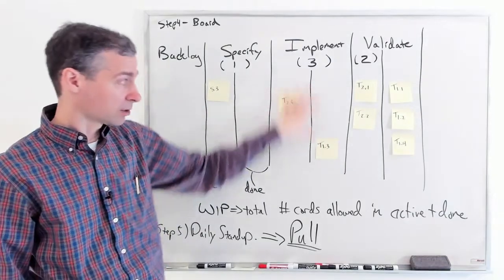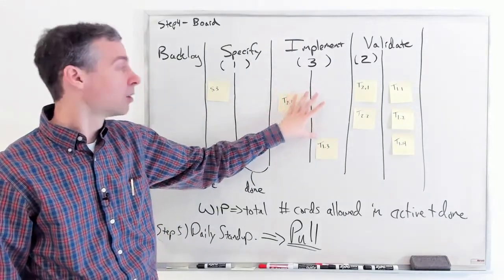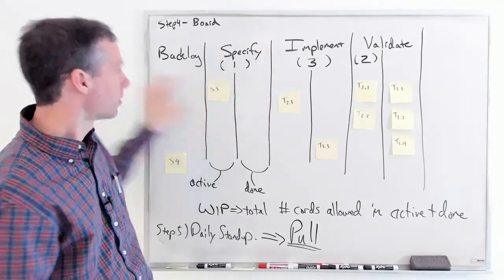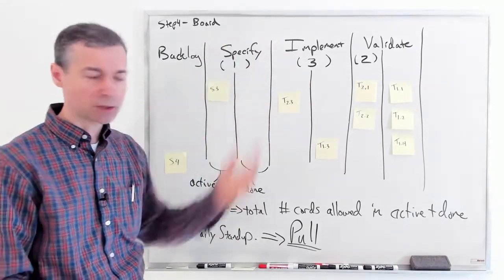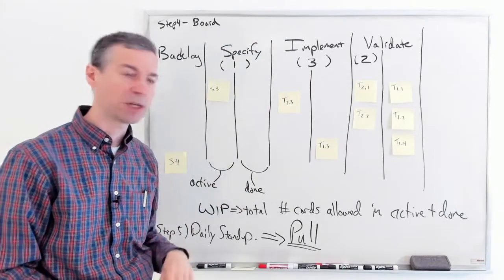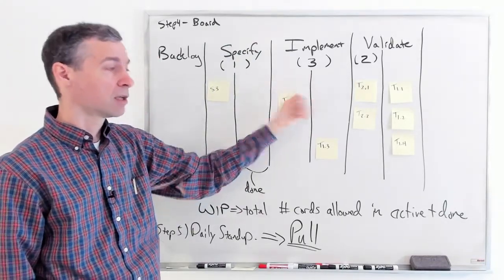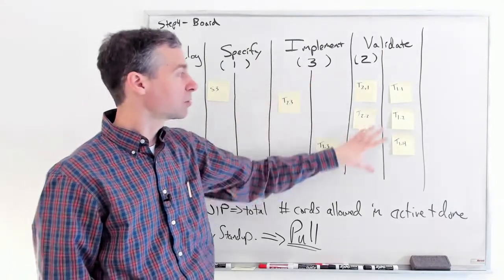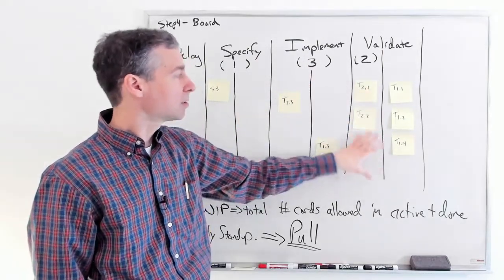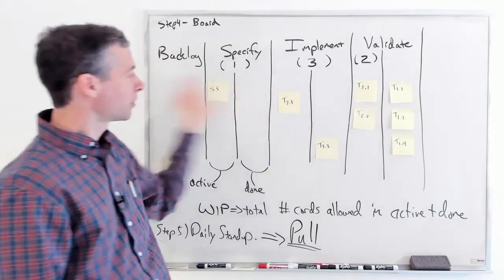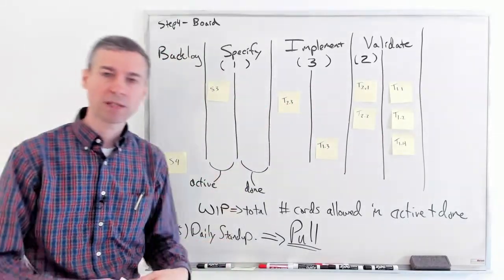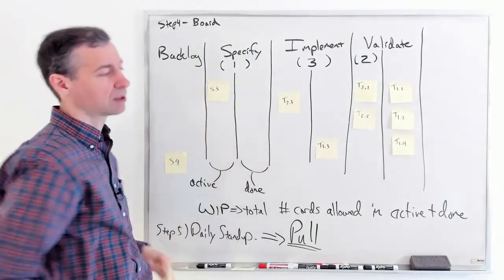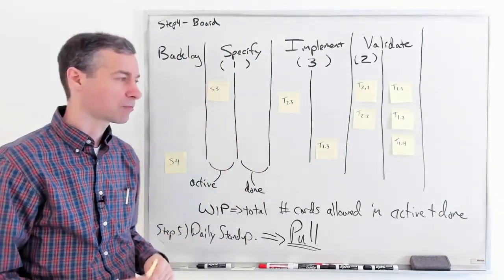That slows down their work, which then, because they won't pull any more work, people won't waste their time specifying or doing anything up the chain until these guys are ready for more work. So if these guys are producing bugs and these guys find them, that slows down their work, but naturally we maintain an even flow and we don't waste effort on upstream items.